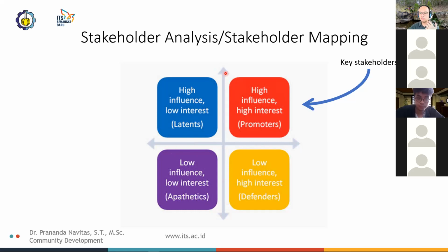low influence, high influence, and low to high interest in the efforts run along a line from left to right, or horizontally. Now, both influence and interest can be either positive or negative, depending on the perspectives of the stakeholders in question. And the lines describing them are continuous, meaning that people can have any degree of interest from none to as high as possible, including any points in between.